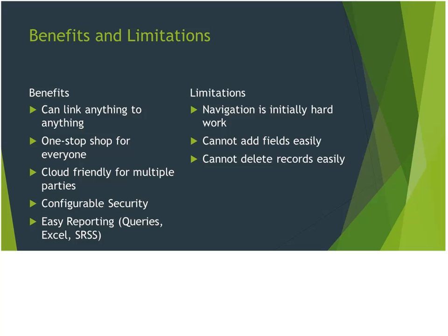The structure is also very flexible in that you can link anything to anything. With connections like that, in our case, we set up the business requirements directly to the development modules. Now, for a more agile project, you might link them directly to tasks. So you say, well, you need that requirement, right, I'll do a task for this module which will address that specific requirement. And the reporting inside TFS is geared towards that. It assumes that you link the business requirements directly to a task. In our case, it wasn't quite appropriate. We had 1,000 business requirements and we had nowhere near 1,000 tasks, and the alignment was closer to the development modules. So that's how we linked it.